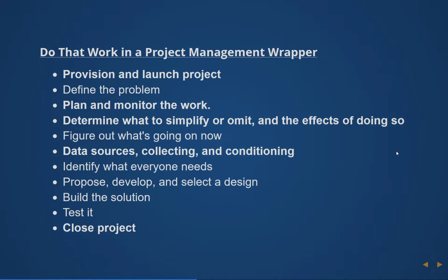Ideally, that will mean maintaining and filing away all the records, having a review to capture lessons learned, and providing training and feedback so the organization as a whole continues to improve.